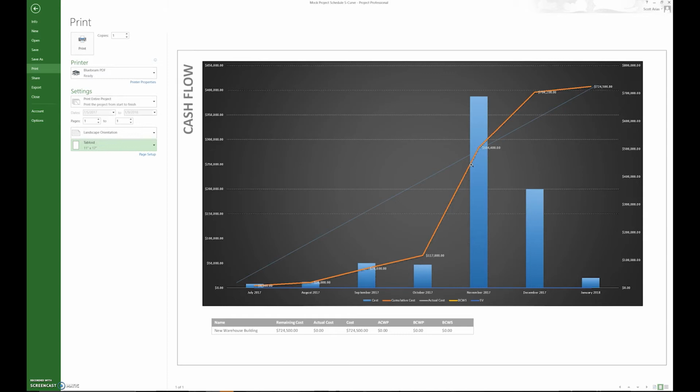So it's important to produce this report so they can look at it. You see, remember I drew in that line there, that hypothetical line, and it's kind of an explanation a little bit of what you're doing. Hey, this is where we hypothetically should be. This is where we actually are. So it shows the difference there. And it shows that you're not front end loading, meaning your orange line is not above that hypothetical line.